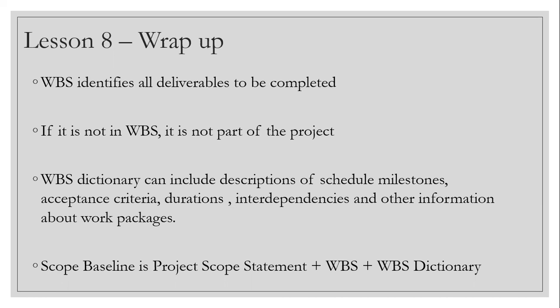Now, when you are working, let's say for CIB day one, we know the UAT very well, right? Most of us will know the UAT like the back of their hand. But when you are thinking about a large complex project for an external client, you may not be too thorough. That's when the client has to tell you these are the acceptance criteria. So when you move the data from the on-prem data center to the cloud, the delivery manager of the client team will be running a particular XYZ test, and they will ensure that, after running the test, we are coming to a conclusion that all the acceptance criteria have been met. So that all will be defined in the WBS dictionary.